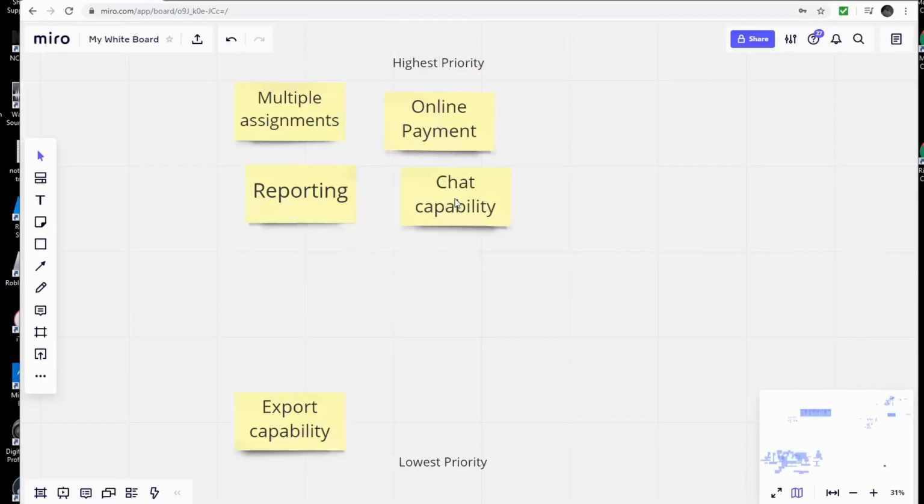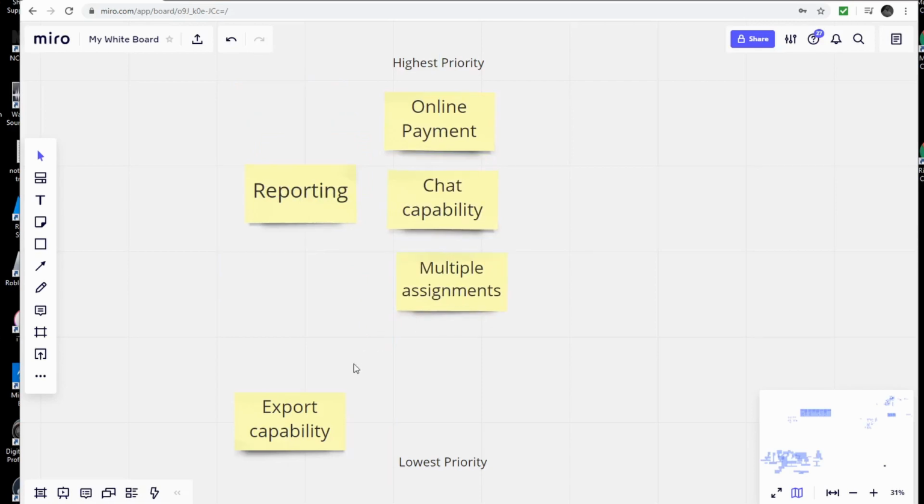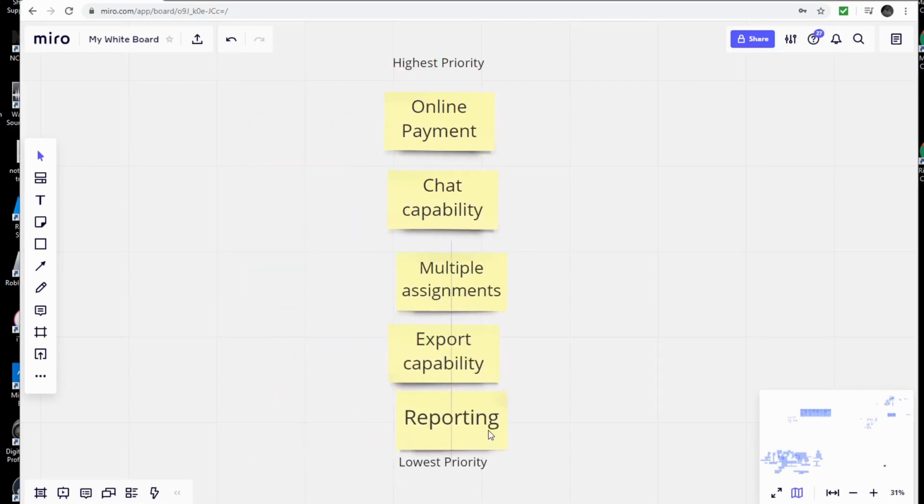Now, the way it works is this: once you have your listing of your items, your features, in this instance, you call it features or epics again. Doesn't really matter what you call them, it's this big chunk of work. You need to make sure you order them based on priority and then based on teams. So we're going to go into the meeting and have a conversation. Usually the product owner or program manager will talk about the big chunk of work and say, hey, we're going to go do this. And based on this, there are 5 big chunks of work that we need to do, and here is what they are. Then we take each one of those, then we discuss basically what needs to be done.